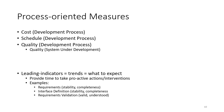Process-oriented measures cover cost, schedule, and quality of the development process — traditional system engineering measures. The SE handbook makes a point of discussing leading indicators: measurements that provide a sense of what's about to happen next. They may take the form of trends or proxies and provide ways of understanding what problems could be coming up soon within the project, giving project managers a way to be proactive with their actions and interventions.